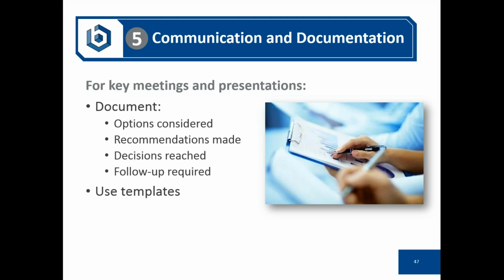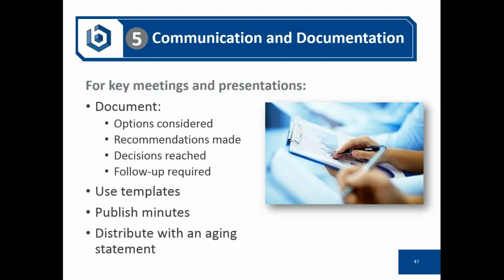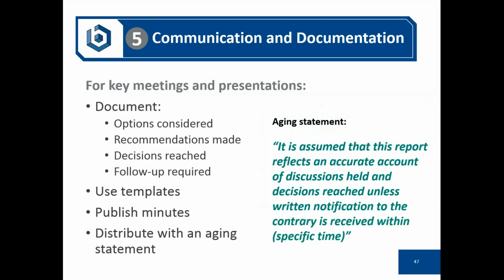We recommend that you establish meeting minute templates and agenda templates that can help you be efficient in this process. You need to publish those minutes in a timely manner with an aging statement that says this is assumed accurate unless you notify us within 3 days, 5 days, 7 days, whatever it might be. Then it becomes part of the project record.